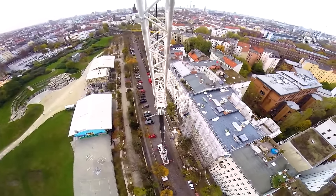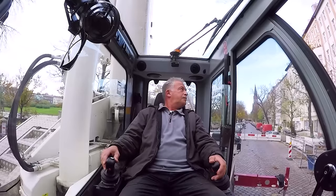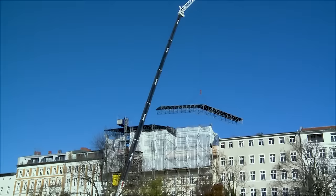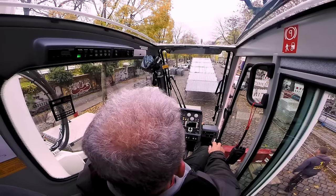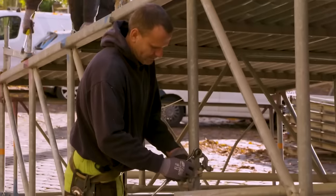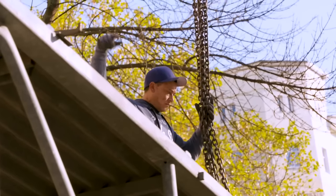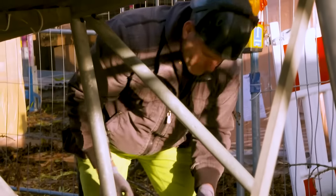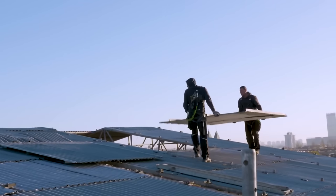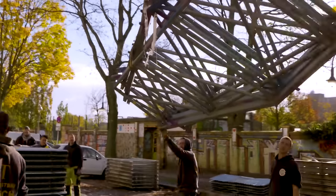Work on the construction site in Berlin-Kreuzberg is also progressing well. Crane operator Eddie Kirkelich is lifting the weather protection roof off a 26-meter-high residential building. Down on the floor, all the individual elements are dismantled. Originally, 2 days were planned for this, but it's cold, and the men are moving at a tremendous pace. They want to get finished. Plus, every day of crane operation costs money.